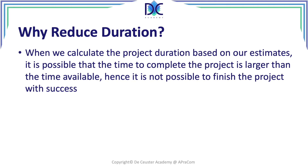Let's have a look at the reason why we want to reduce duration. When we calculate the project duration, we use our estimates — estimates of activity duration and the precedence diagram that we created. In some cases we will find that the time we need to finish the project is more than what we have, depending on the customer or organization for whom we are doing this project. When we cannot complete the project on time, we cannot say that our project is a success.